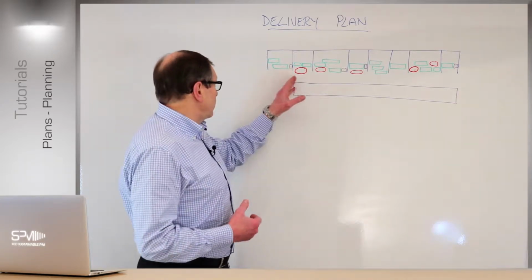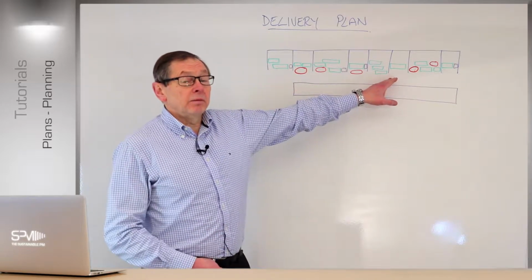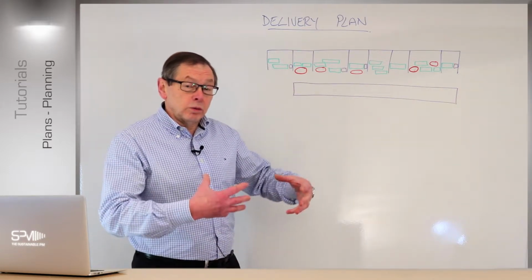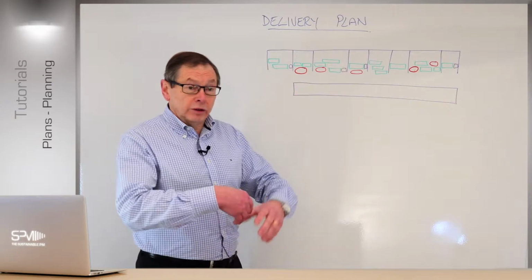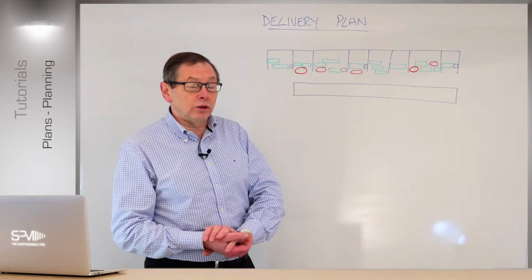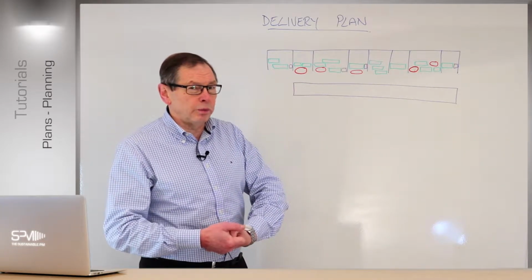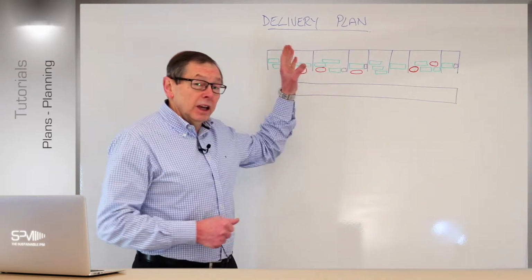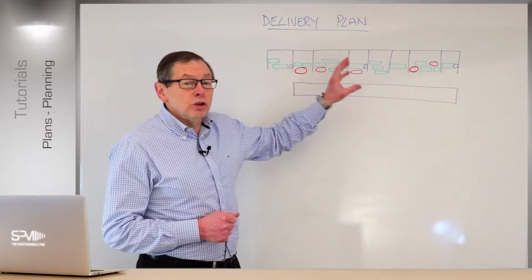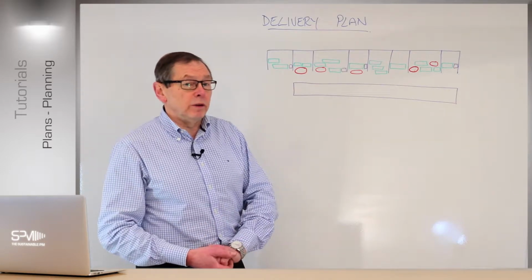Remember, a lot of the time we're putting these boundaries in, the blue lines in the plan, from an increment stage or time frame point of view, because we want to make decisions related to budgetary controls, controlling the project, and making sure we're not getting ahead of ourselves. Sometimes you can call them milestones, but that's not the pure reason behind it. The main thing is business go, no-go decision points about what's happening here. So that's usually the prime consideration about where these intersections are.